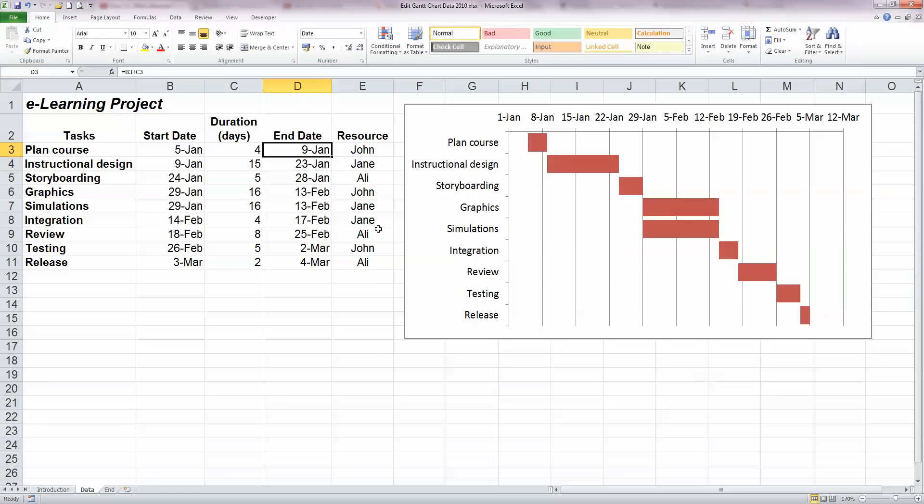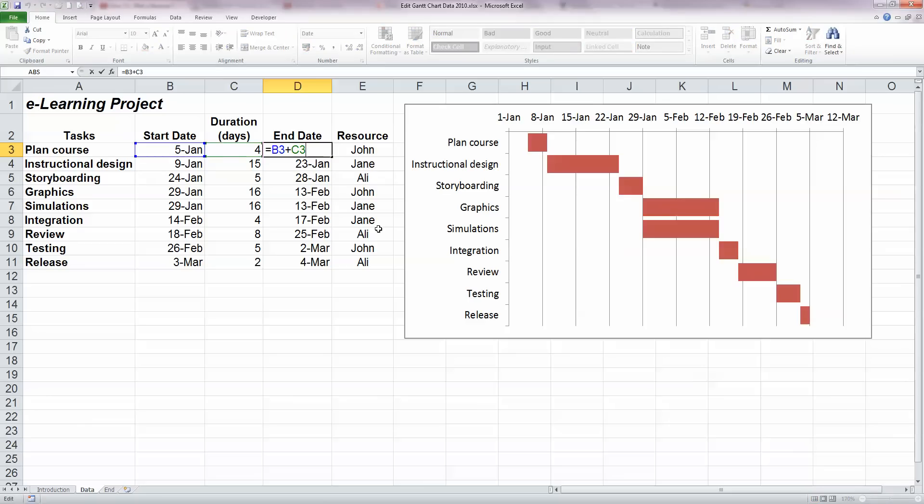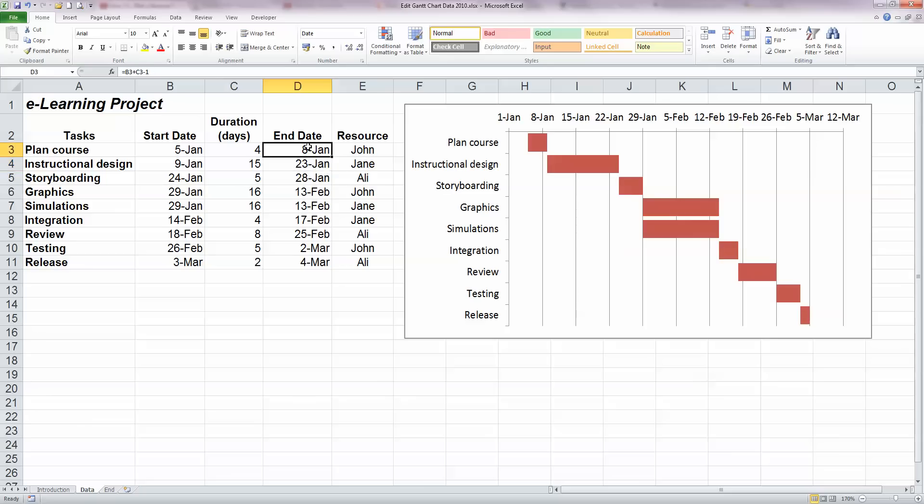Now we can see here that the end date actually is the day 5 days after the start date. Task starting on the 5th of January, which has a duration of 4 days, will be the 5th, 6th, 7th and 8th of January. So we want it to end on the 8th of January. So we need to change the formula here. And the simplest way to do that is just keep the existing formula and add in minus 1 at the end. And that will bring us back to our 8th of January date that you see here.